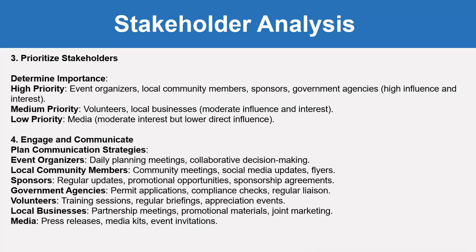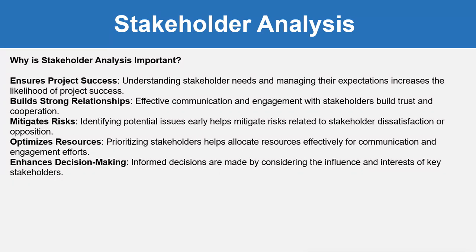Government agencies need permit applications, compliance checks and regular liaison. Volunteers need training sessions, regular briefings and appreciation events. Local businesses need partnership meetings, promotional materials and joint marketing. Media need press releases, media kits and event invitations.